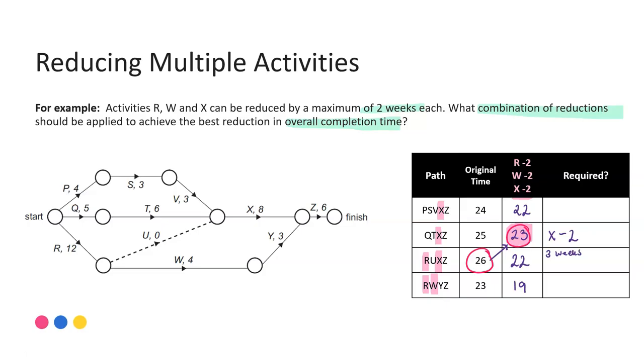Now if I've already said in order to achieve the new critical path that I have to do X by two then let's use that, because that saving or that reduction is already going to be applied. So I've now cut it by two weeks, I'm down to 24. I need an additional one week and my only option is to use activity R. By looking at the new critical path first that helped me identify what I absolutely have to do to achieve that new time of 23. And then I look at what else might be needed. So now I know I also need to reduce R by one.